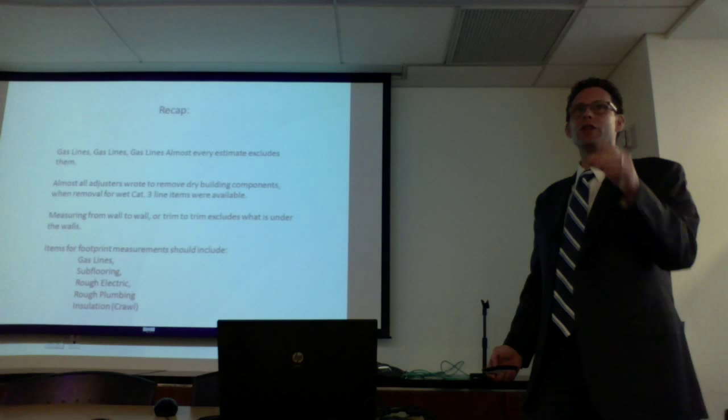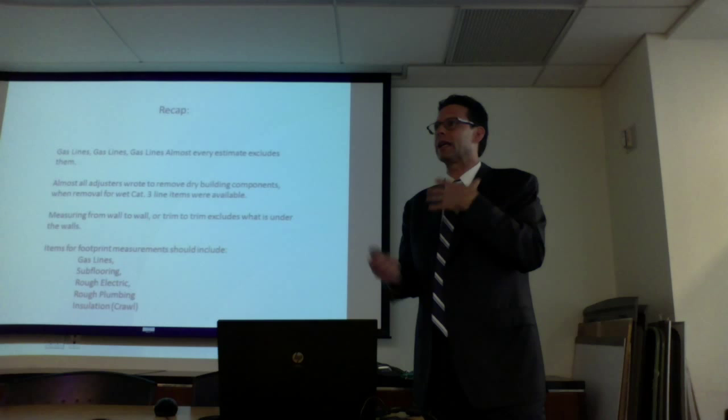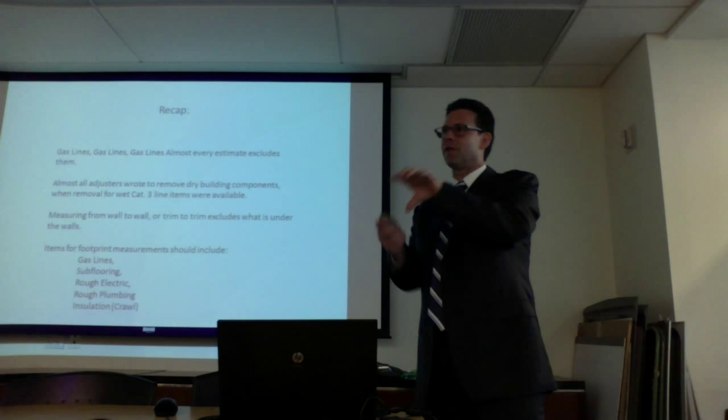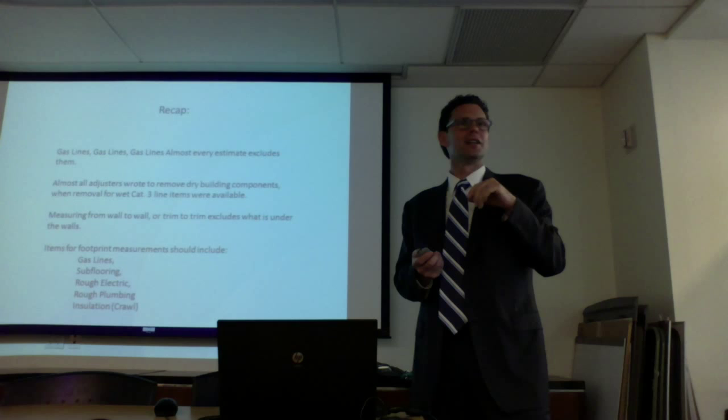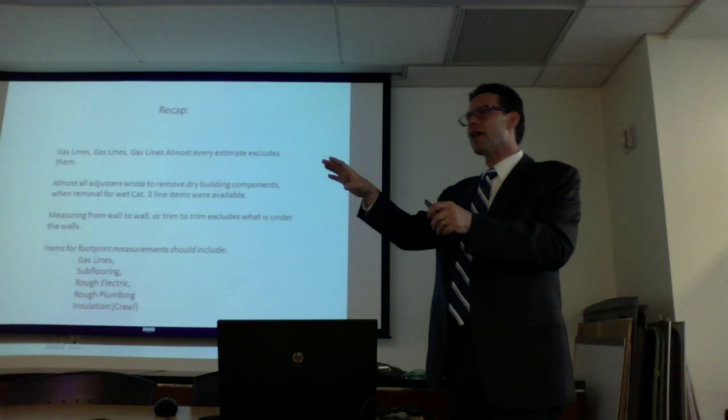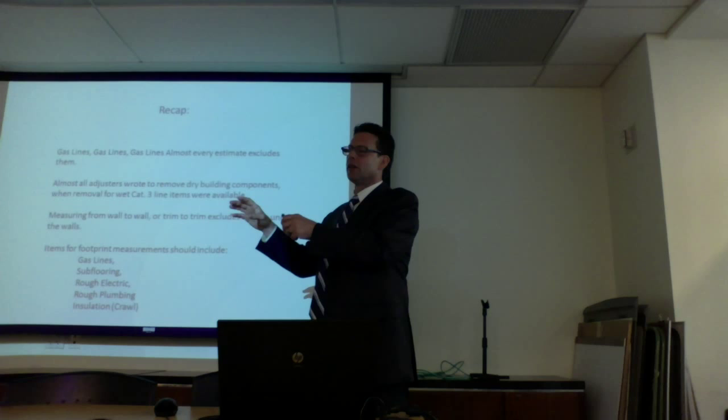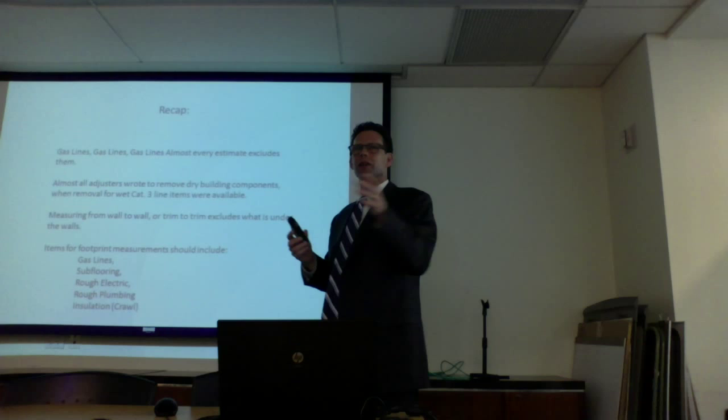So when you start reviewing estimates, you'll notice, let's say you get this. I have the benefit of being involved in over 1,000 claims, and I could pull an adjuster and pull five estimates from that adjuster. It's the exact same estimate. The rooms are the exact same rooms. So I go on re-inspects, and I start in the master bedroom. There's three windows, five outlets, a ceiling fan, and whatever. I go into the son's bedroom. There's only one window, and there's a ceiling fan, but there's only three outlets and one switch, but there's three windows in that estimate. So it's just a cut and paste.